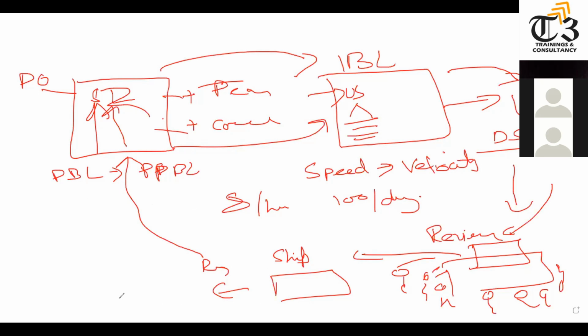Once we finish the review, whatever the situation is, we will do the sprint retrospective meeting. In predictive, we have the lessons learned meeting. In Agile, we have retrospective meetings, which means we check ourselves: what was good, we should continue doing; what are the bad practices, we should not do; and these are innovations. So you are doing continuous improvement according to Deming, PDCA, plan, do, check, act. So you are doing the retrospective, and you are minimizing the waste.